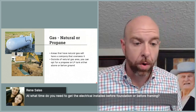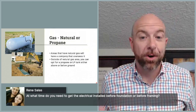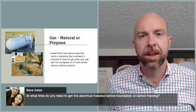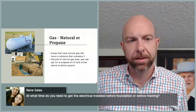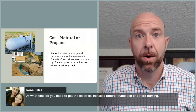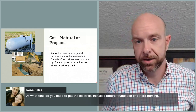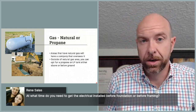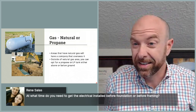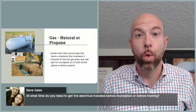All right, Renee. Our recommendation is always as early as possible. A lot of these co-ops, because they're not big giant power companies, don't have the manpower or the equipment to just do something every single day. So a lot of them have wait lists. We've seen 2, 4 to 6, even in some rare cases 8-week wait lists on getting work done to get power.